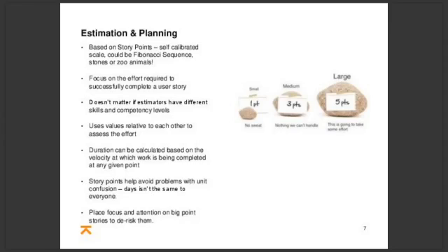So, in doing that, the three of us can quickly agree that the sports car will be the easiest and the coach will be hardest. The 4-door hatch falls somewhere in the middle of the two. So on that basis, we decided that 2 of us should start on the coach and 1 of us should start on the sports car. Then the person on the car could join us washing the coach if they get done quickly on the car, as we suspect they will.